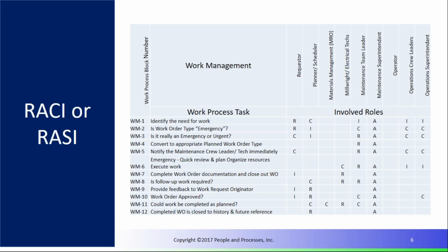And then we have what's called a RACI: responsibility, accountability, consult or support, and then information. If we think about the RACI, responsibility is the doer. Who actually is responsible to execute this? The A is accountability. The buck has to stop somewhere. And typically for any given task, you only find one person, except with very, very rare exceptions where you have two. You only typically have one person who's ultimately accountable for the execution of that task.